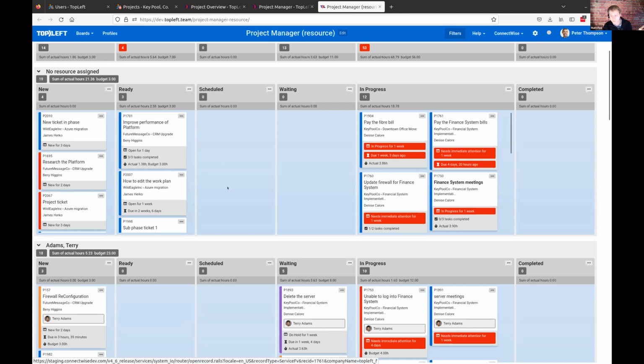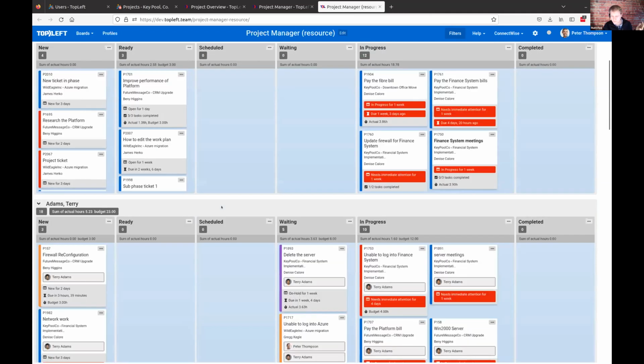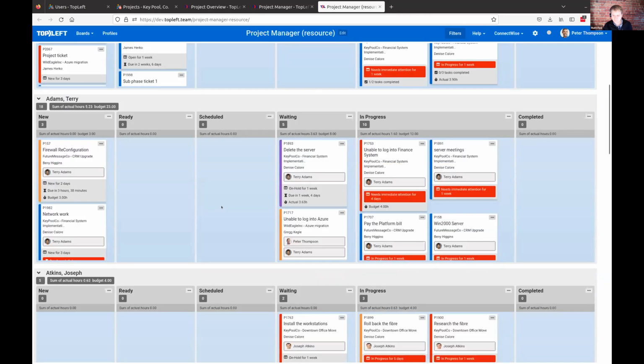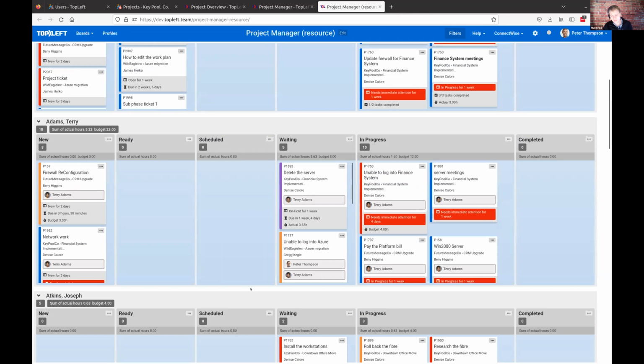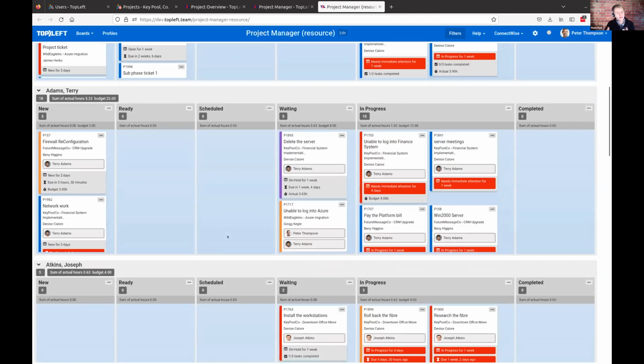So we have a lane that shows us the unassigned tickets, followed by a lane for each team member showing the tickets according to who they're assigned to. In a view like this, you can actually drag them between the swim lanes to reassign them. So it makes that job very easy. For example, if you see that maybe your senior engineer has twice as many tickets as anybody else, and so the senior engineer is the bottleneck in your team. Too much work has to go through him or her, and so you want to address that. Maybe you notice that there is some work in that engineer's queue that can be done by a more junior engineer, and so that's a great way to start speeding up that work. So yeah, for sure, just drag that ticket from one swim lane to the next, and that gets reassigned. So it can make things very easy in that way, and give you new ways to look at that data.